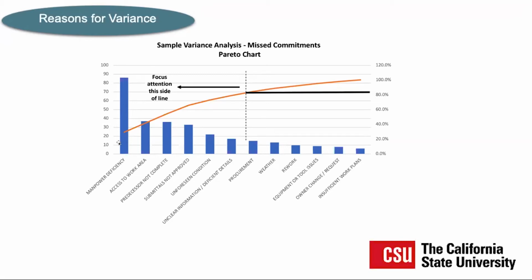We've had jobs where the labor deficiency for the craft labor was a function of, ask why, well, they didn't send any more from the home office. Well, why didn't they send any more from the home office? Well, we didn't ask. Or, we asked, but we didn't ask the right person. So you asked the right person? Yes, we asked the right person. Well, why didn't they send anybody? Well, we couldn't afford to send anybody more. Well, why couldn't you afford to send anyone? Well, we have a cash flow problem. Oh, okay. So now we understand what the problem is we're trying to deal with.